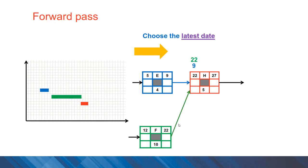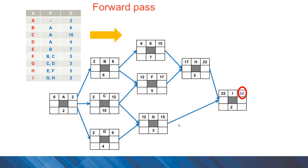Here is an example for activity H. You can see we have two options as the early start time: 9 coming from activity E or 22 coming from activity F. In the forward pass, the rule is to choose the latest date. In this case, 22 days. You can complete the forward pass for this project, and the completion time of 24 days is calculated.